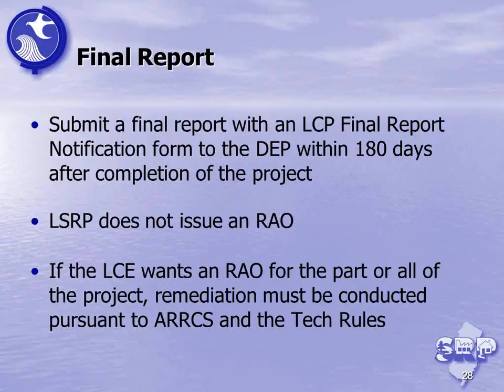So if your project's been undertaken over 5 or 7 years, and it's got various phases, you can leave your reporting to the very end. You have 180 days to submit it, and it can capture all components of the project in that one report.